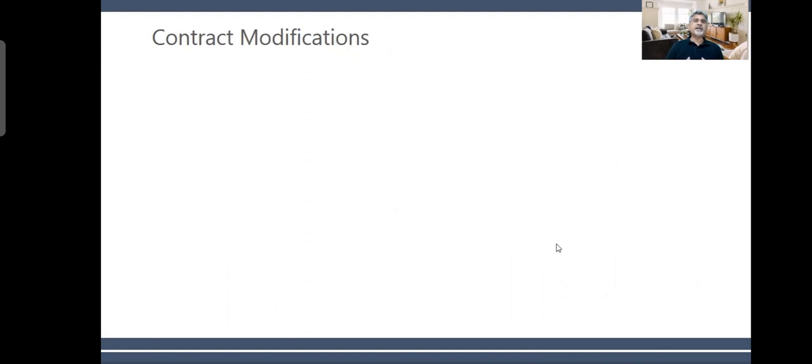You might have contract modifications. When you have an existing contract and you change some terms and conditions, will it remain the same old contract that you can modify, or is it necessary to create a new contract? The question is that I already have a contract for provision of some services with my client, and then the client says, do this thing also. Now that's an additional requirement, and it might come after 2 months, 3 months, 6 months. And by the way, we have a lot of variations. We call them VO. What is a VO? VO is called a variation order.